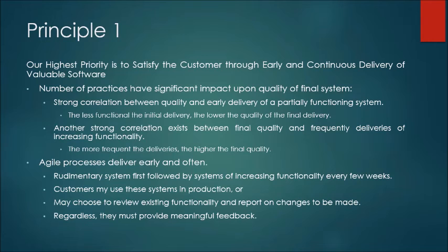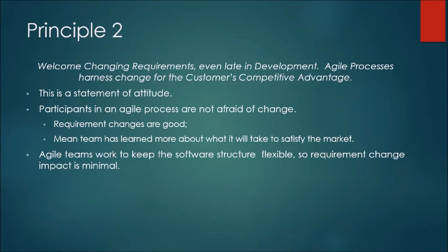Agile processes deliver early and often. A rudimentary system first, followed by systems of increasing functionality every few weeks. The customer may use these systems in production or may choose to review existing functionality and report on changes to be made. Regardless, they must provide meaningful feedback. That is an important point. They need to give the feedback, they need to criticize it or they need to accept it right in the beginning.